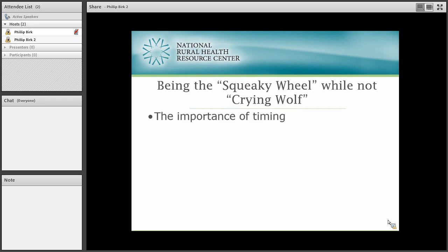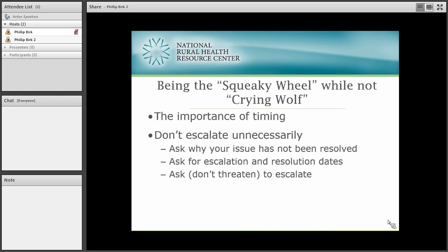Once you do that, you may be able to hold back on support fees and other fees until they resolve the problem. But you have to follow the letter of your contract. There may be response time guarantees in your contract. Most contracts do have that. And there may be penalties for not living up to them. So understand your contract, review it.